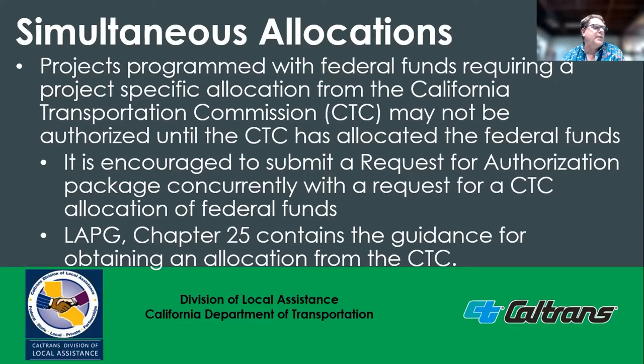Authorization of federal funds will not occur until the CTC has taken action and allocated the federal funds. The simultaneous process will prevent any delay of authorizing the federal funds after the CTC has made the allocation and minimize the impact to timely use of funds deadlines. Chapter 25 of the Local Assistance Program Guidelines covers a broad spectrum of necessary guidance and information regarding working with the CTC programs and obtaining an allocation.